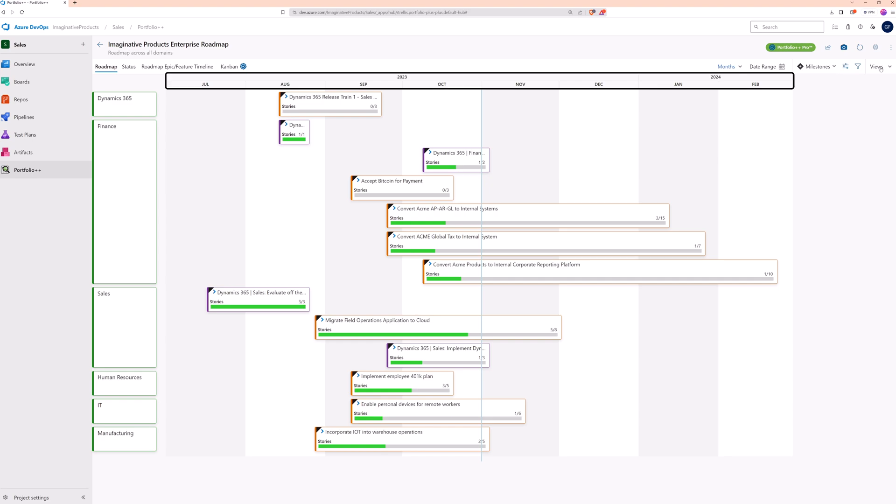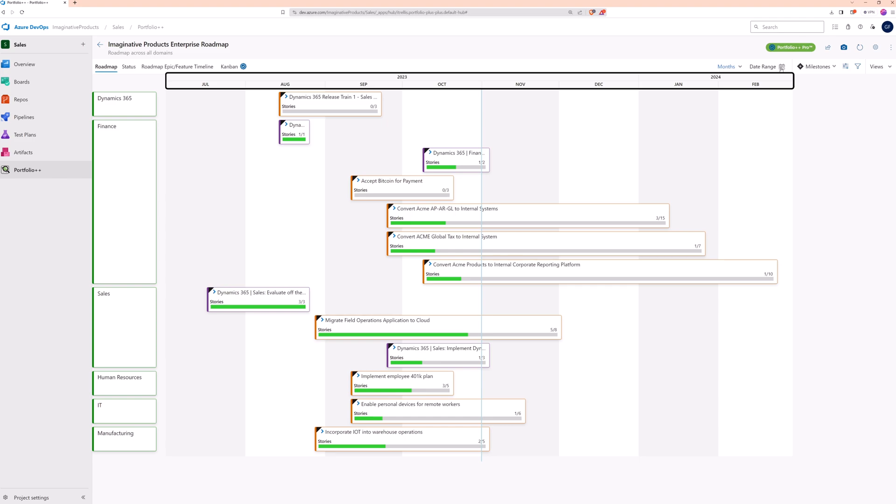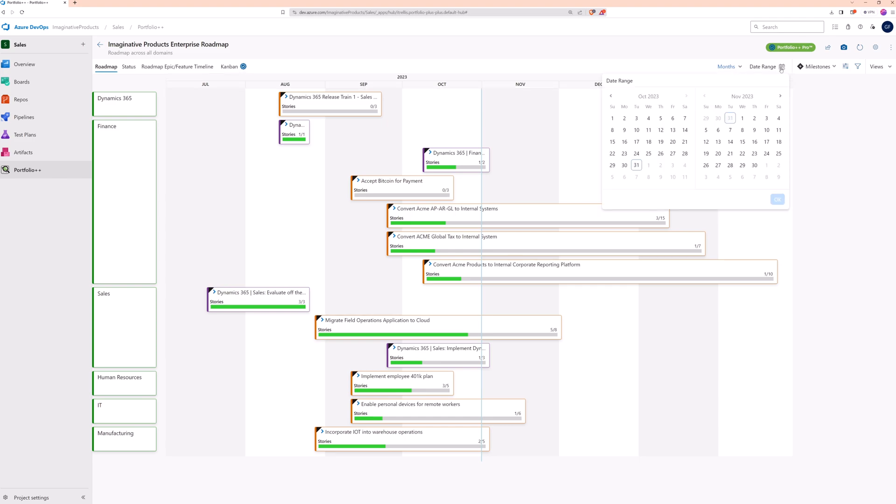Next, let's look at the roadmap's duration. By default, it's generated based on the iterations of the selected work items and their children. But if you want to change it, you can add a date filter.